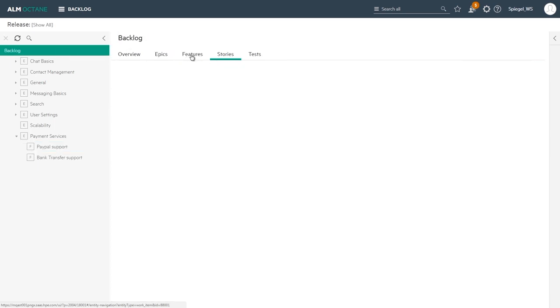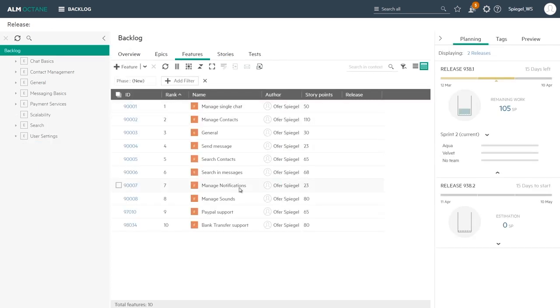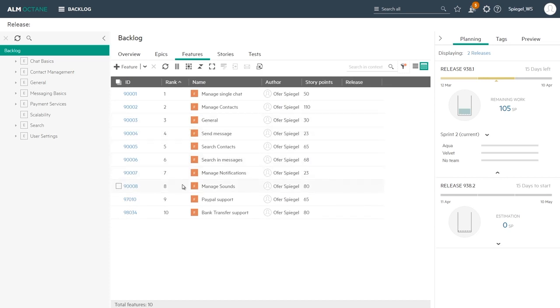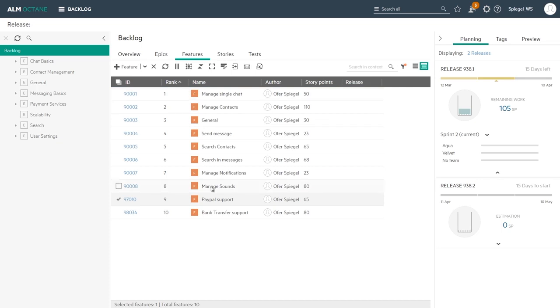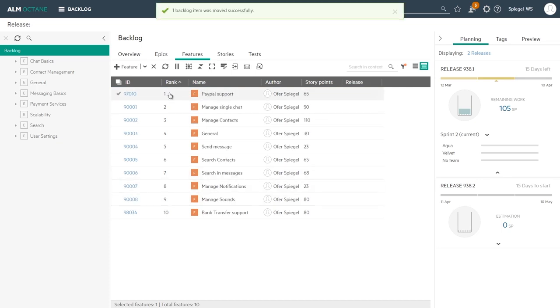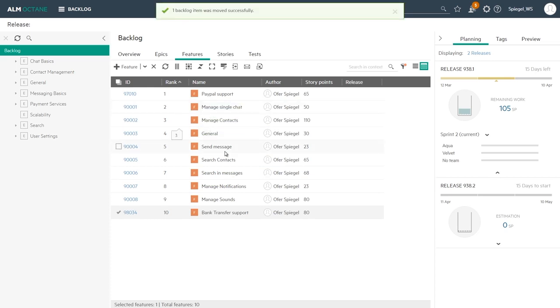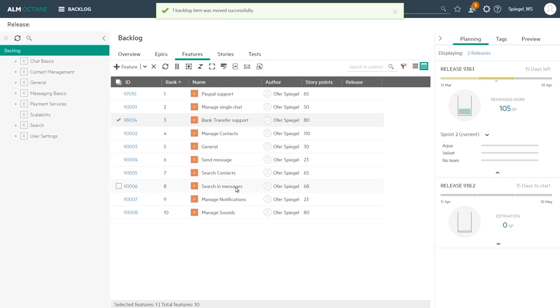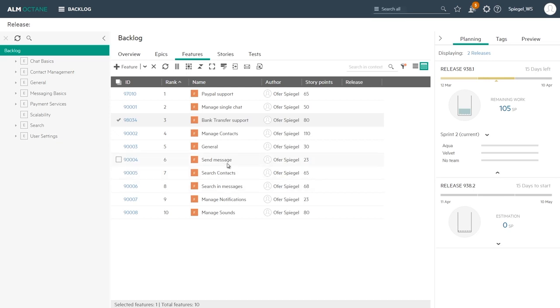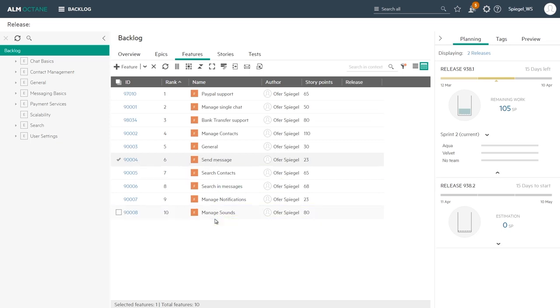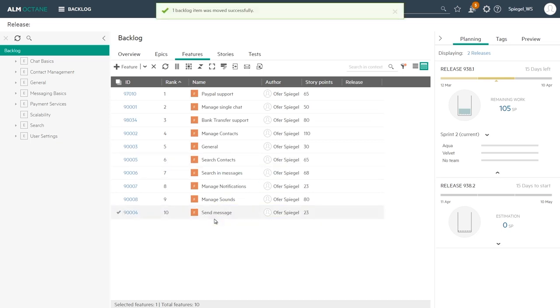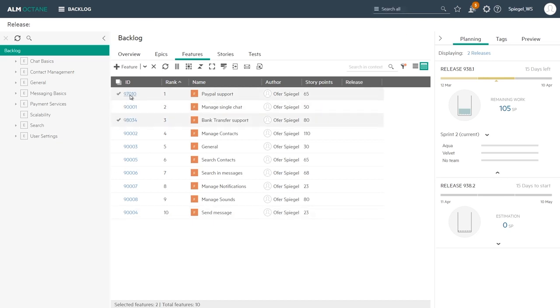Once we have that structured in place, we can go and rank our features. We sort it by the rank column and we can see all those new features. We can take one, let's say that PayPal support, I want that to be number one, to be the top ranked item to be done first. And the bank transfer, that can be third item after that managed single chat. Let's say I want the send message feature to be placed at the bottom, it's not that critical.